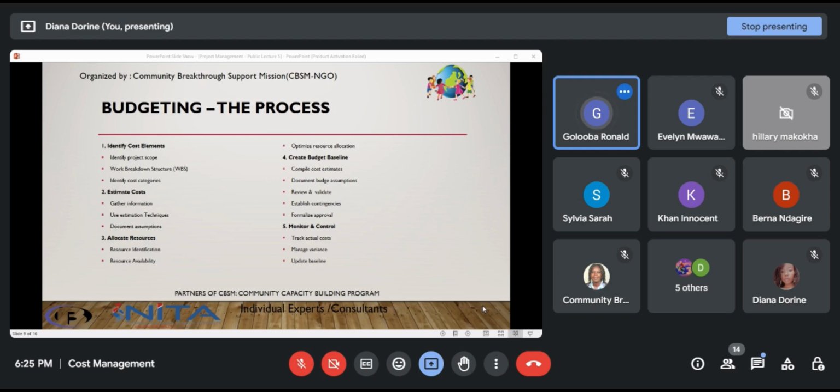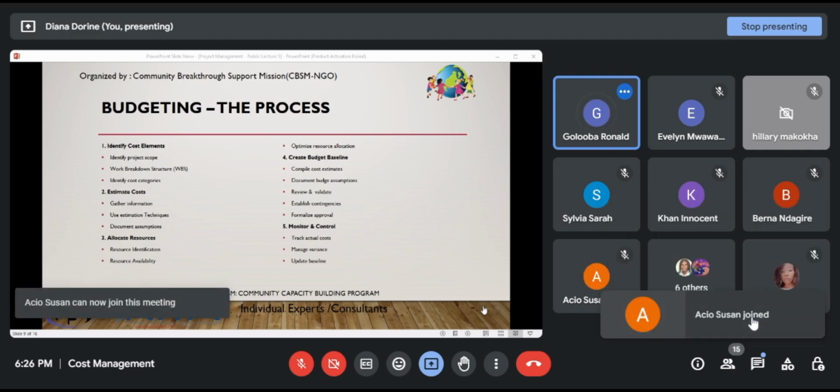And these can be, for example, you might have labor as a cost category. And so within that labor, you are looking at the IT person. And this IT person has to get salary. This IT person has to get benefits. This IT person has to get medical insurance. This IT person and all those others will need to incur some administrative costs. So you are budgeting for labor, and you're looking at individual level, and then from each individual level, you're categorizing that as labor costs.